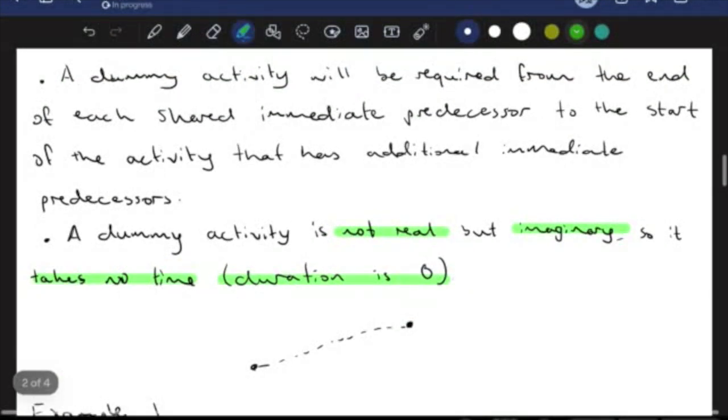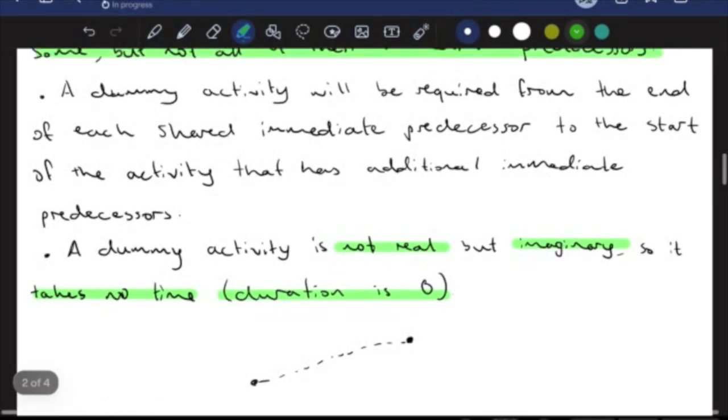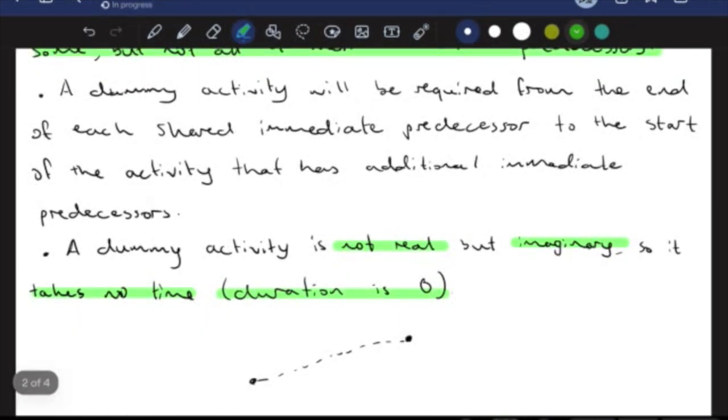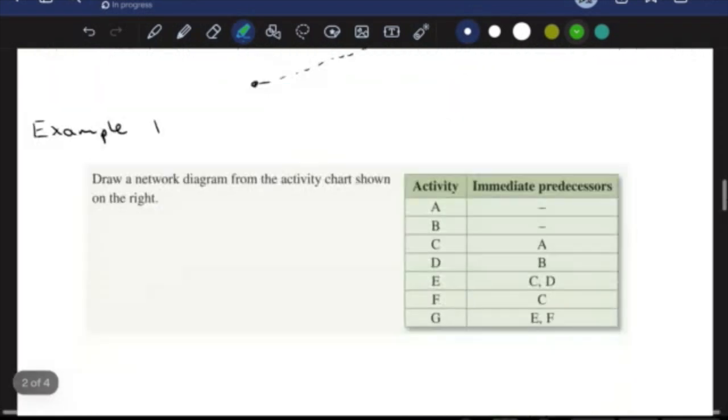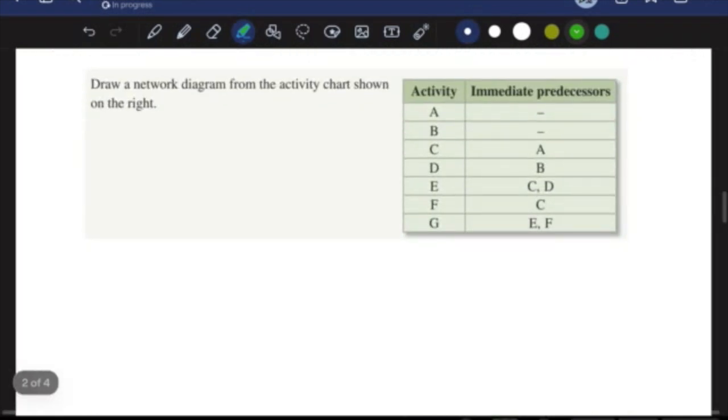Now on our actual network diagram, it is going to look like this. Normally with our vertices we have a full closed line as the edge joining the two vertices. Here it is going to be a dotted line to denote that this is in fact a dummy activity and not a real activity. We give it its own kind of name. Now, when we look at a network diagram like this, I'm just going to start drawing it as we would in the past, and we're going to stop and see when an issue occurs.